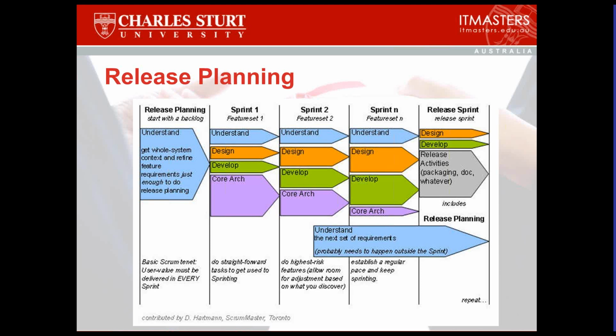Remember I said before, the customer has the opportunity to say, look, I don't want this anymore, I want more of this because this is really good. Or maybe they do it the other way around. They say, look, I want more of that. What can we drop off our project to make room for it? Well, if you're 95% of the way through the project, what can you drop off to make room for that interesting thing? Or what can you drop off to deal with this high-risk outcome that's just giving you some alarm bells? Well, not much. And that's the whole point. You do it when you've got plenty of room to move and to modify and adapt.